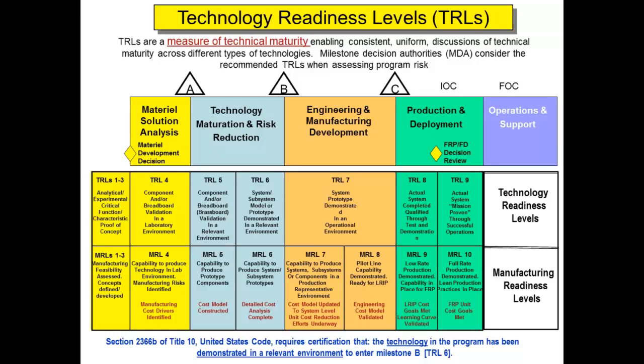Yep. So let's take a look at performance piece. So we just said that the APB, the acquisition baseline, consisted of performance, cost, and schedule. So let's look at performance. So KPPs, a limited number of measurable and testable attributes. These are the critical, most essential things that piece of equipment needs to be able to do that are measurable and testable. So underneath KPPs, there are a few that are required, again, congressionally directed.